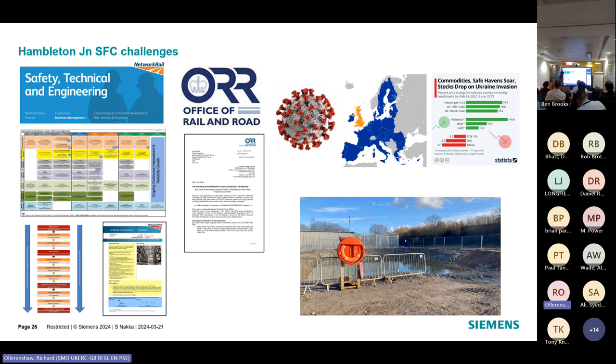We also had some other challenges we didn't plan for. COVID. We started Group 5 design in 2020, and COVID hit. We've seen the complexity of the construction already. The design was even more complicated, at something like 800 deliverables across multiple disciplines: civil, electrical, high voltage, low voltage, protection and control, with not just SFC but everything else new as well. We had introduced new protection relays, with dual redundancy within the relays as well. So to do all of that over Teams was just a nightmare.